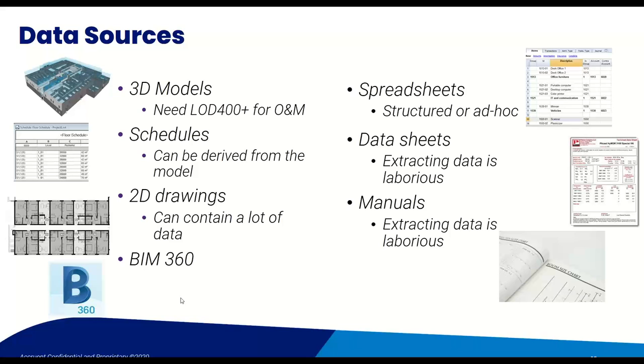The data that we need and that we get from the engineering and construction projects, they can come in a lot of different formats. So 3D models, so widely used within this audience. A remark to be made there is that in order to be useful for operations and maintenance, the level of detail needs to be fairly high in the model, so LOD 400 or plus or more, because we need to know the precise make of all the pieces of equipment and the precise measurements of all the rooms and other elements in the facility.